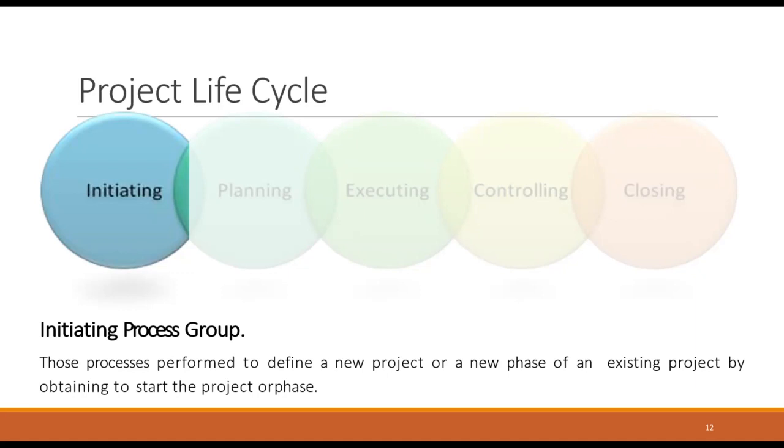Some of the steps in the initiation phase are communicating with the stakeholders to understand the purpose and desired outcome of the project, identifying the project scope, determining the SMART goals, which are specific, measurable, achievable, relevant, and time-bound, clarifying resources like budget and time constraints, confirming team size and roles required, determining how often and which stakeholders will be involved throughout the project, compiling a project proposal and project charter, etc.